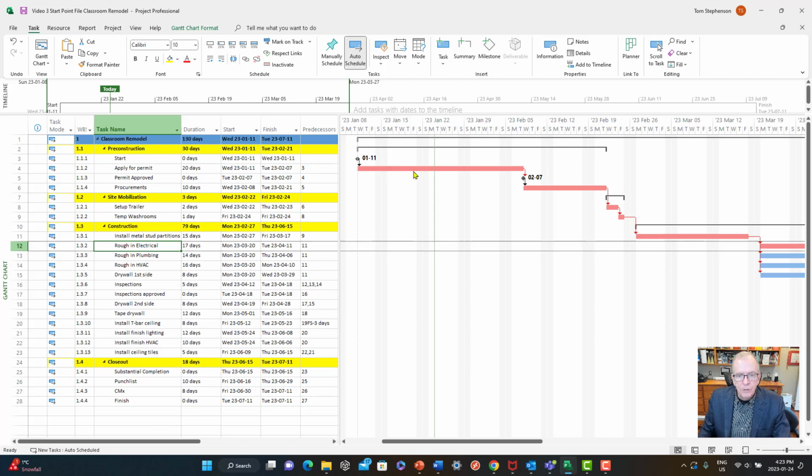Now, what I'm going to say is if you don't put in holidays, then as soon as you have a holiday, you're going to be one day behind schedule because your schedule is going to assume you're working on those days. So it's very important to put all of those holidays in. So let's take a look at the calendar.